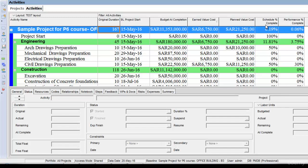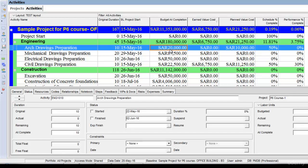Once you go on updating activities, the top-most level of the WBS — the project level — will have its schedule percentage complete and performance percentage complete updated automatically from its child WBS. Looking at the schedule at this time, the schedule percentage complete says it should have been 0.19% (approximately 0.2%), but our performance is only 0.06%, which tells us the project is behind schedule. This is how Primavera P6 calculates earned value cost, planned value cost, schedule percentage complete, and performance percentage complete.